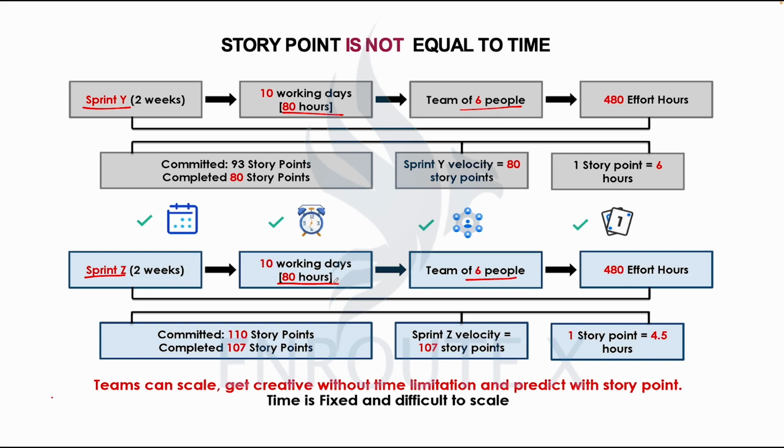So let's put it in mind that they have 80 hours in the sprint, right? 80 hours make a sprint. So in total, all 6 developers multiplied by the 80 hours will give us 480 total time of work. That's why we have 480 here and we have 480 here.